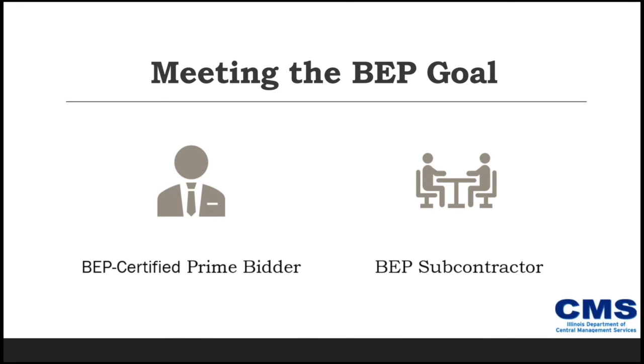Keep in mind, whether you are fulfilling the contract goal as a BEP certified prime bidder or if you are partnering with a BEP subcontractor, your organization or the subcontractors you identify must be certified by BEP at the time of the bid submission. The subcontractor must be BEP certified by the state of Illinois.